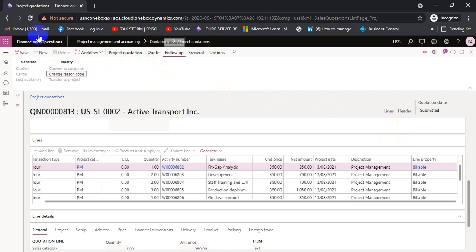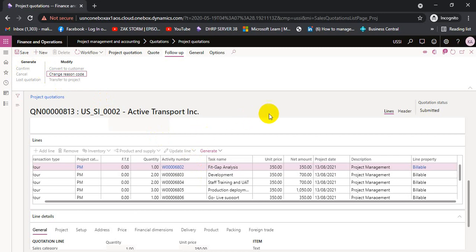If the customer is satisfied and says they are happy with the quotation, we come here to send the quotation again. After it is confirmed, we go to Follow Up and confirm the quotation. Once the quotation is confirmed, we can move it — transfer to project — and after the transfer, the WBS can be transferred to the project and utilized for the whole life cycle of the project.